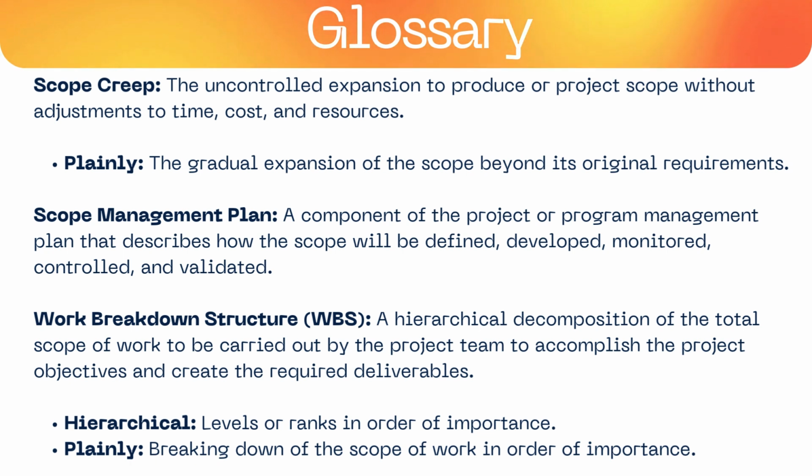So scope verification: you also need to verify the details of what you have now set out to do. This is the process for verifying and validating the completed deliverables against the project scope. So is this something that can be done realistically? We've got it here on paper. This is what the scope says ought to be done, but is it something that can actually be done? It defines the acceptance criteria for your project outcomes.